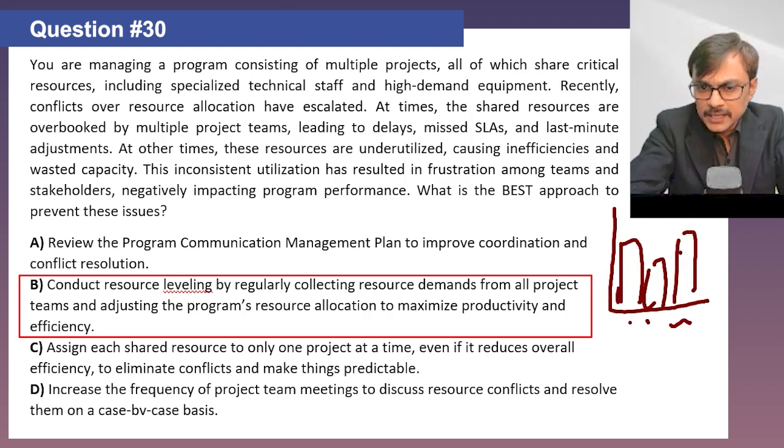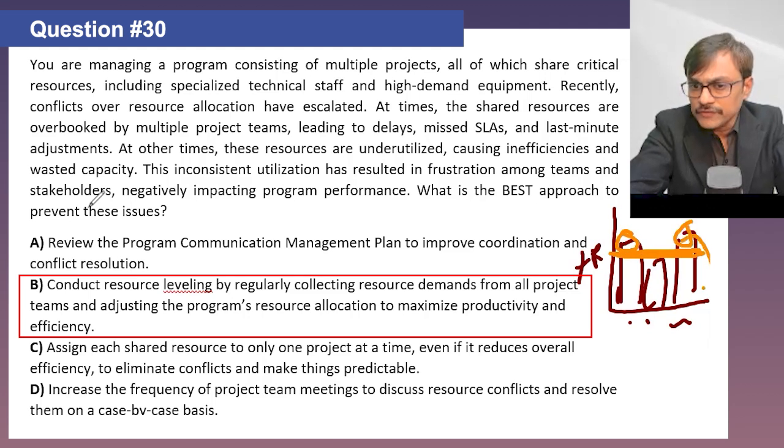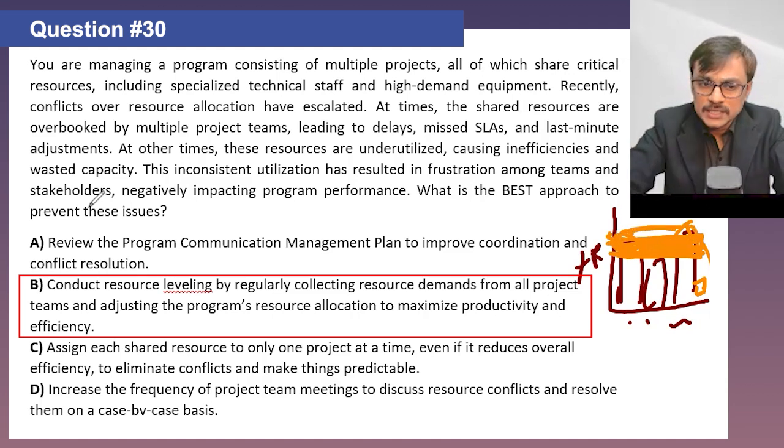Here you have days and here it may have hours or allocations. And then we also understand what is the available capacity or constraint for it, say 8 hours. And whenever we have places where things are going beyond, we need to adjust that. It can also take care of underutilization, but the major focus is making sure the overutilization gets taken care of and we adhere to the constraints which are given to us by the resource plan or resource calendar.